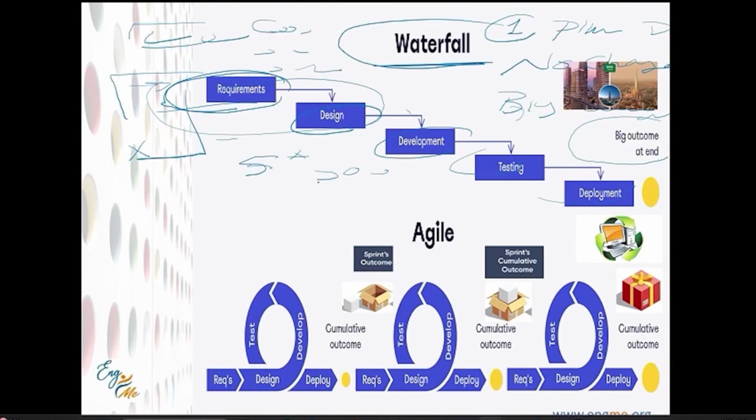If everything is clear, scope is very clear, and all the requirements are in your hand from the beginning, the proper way is the waterfall. It is the best approach for your project. Going step by step, stage by stage. If the water goes down, it doesn't come up again. I think it's very clear. And you can expect your product at end. You couldn't expect anything in between stages. Changes allowed in extreme condition. Any changes related to cost baseline, scope baseline, or schedule baseline, there's no authority of a project manager. He should escalate this to CCB to take a decision.